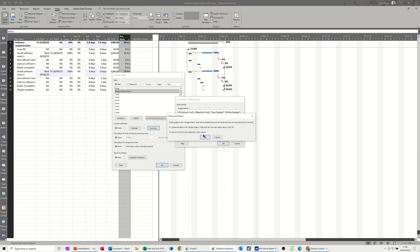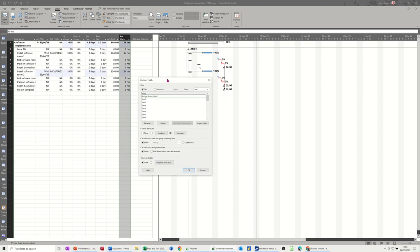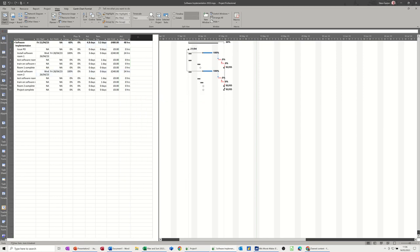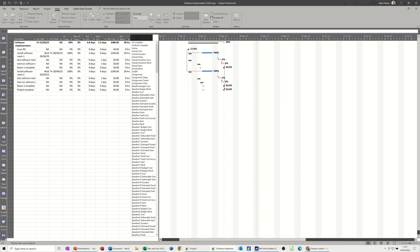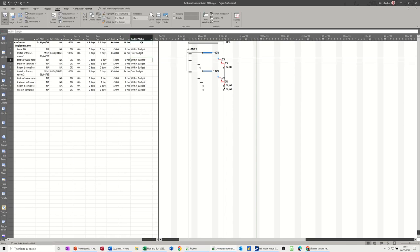It tells you it's going to change that information. If there was an error there, it would come up with syntax error and then you'd have to look at your formula. If I click OK to that and then insert that column, which is just text one. So I can go there and type T, text one. It's called budget status as well. You've got within budget, over budget. These two that I've just made or elongated, obviously over budget.